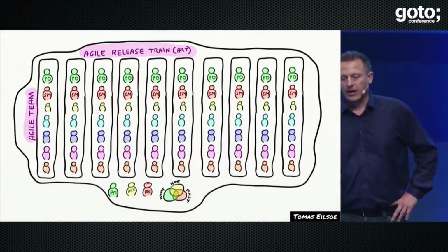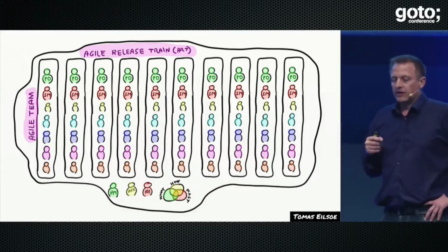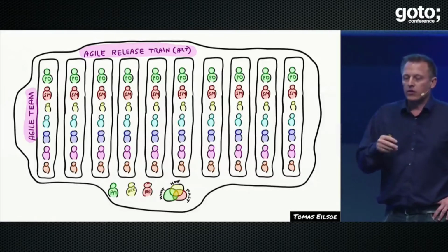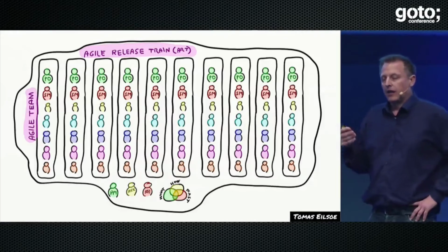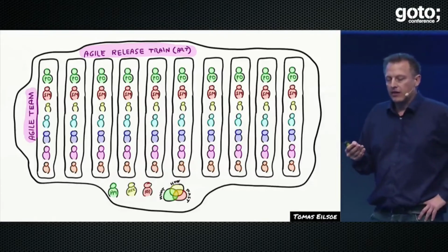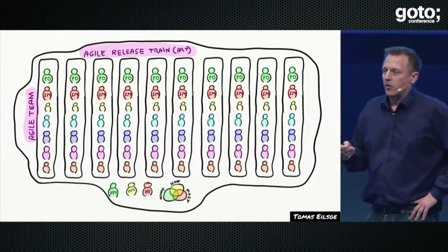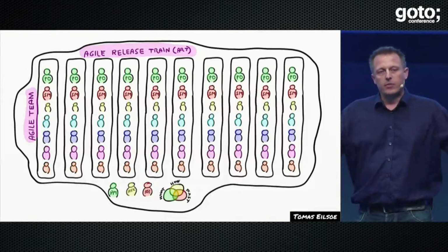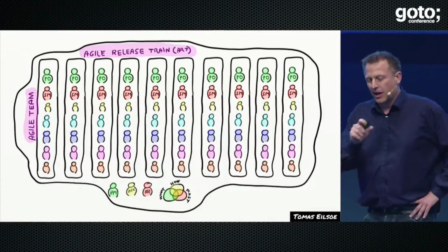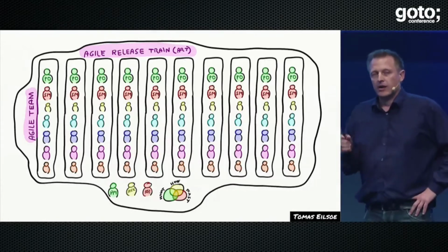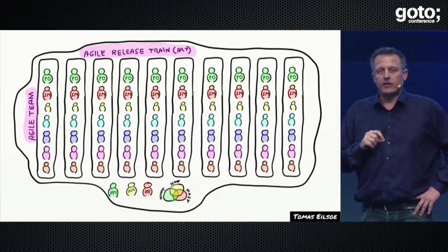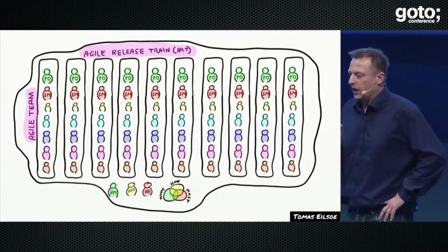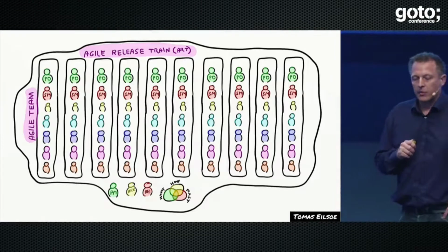They are sort of servant leaders for this group of teams of teams, also called an Agile release train or ART. And what they do is you have product management, the PM, who looks at what we should do. Then you have an architect and a release train engineer. The release train engineer is basically a Scrum master. So sort of the same roles as a Scrum team, just at a bigger fractal scale there. Now, the architect is a bit weird, actually, especially if you read the Agile Manifesto. So I'm going to talk to you a little bit about those roles in a bit.